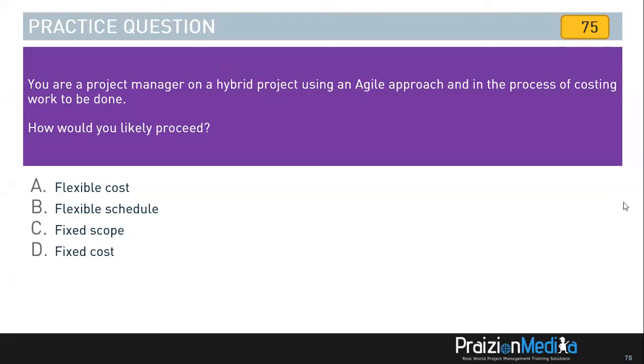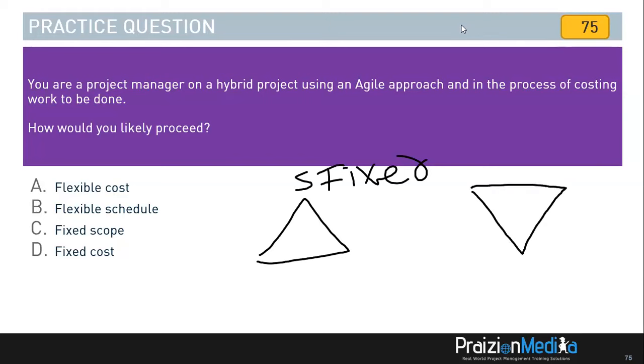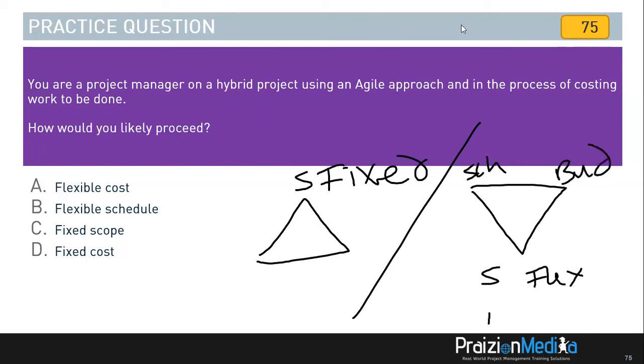Best answer to choose in the light of this being an agile project is exemplified in the inverted triangle as presented by DSDM in the Agile Practice Guide. You do recall that in the world of predictive, we often have scope fixed. And in the world of agile, we have the scope as flexible. But the schedule and the budget in agile, remember, schedule and budget are now fixed.